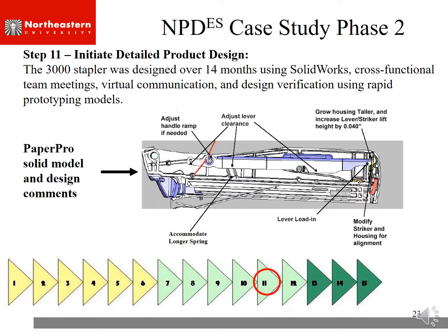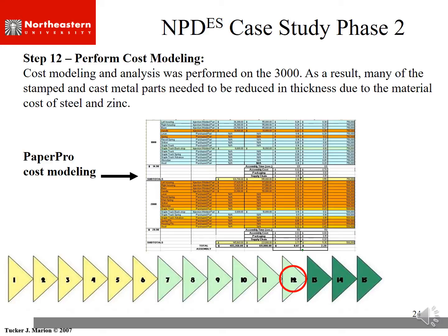So we're at the step where we start to cost out the product. The financial comes into play. Start to look at the components that are required, the tooling that's required, the assembly costs that are required, and we do a cost build.